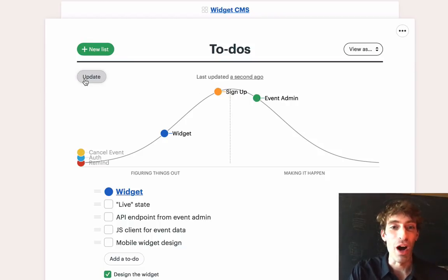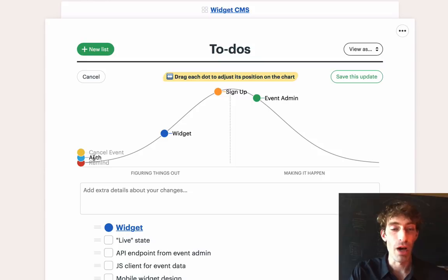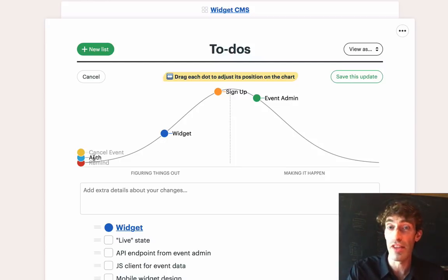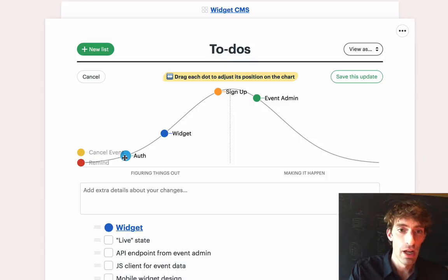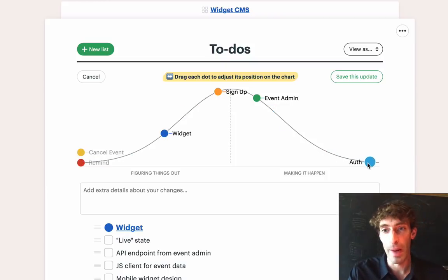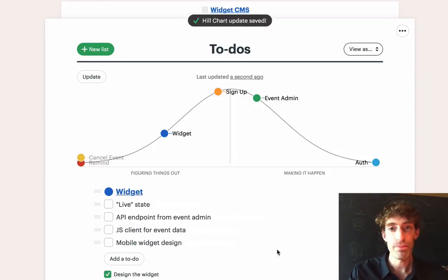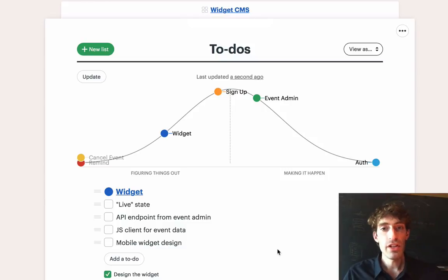So actually auth went from a whole scope of work that could have involved maybe integration with an IT system and setting up a permission rule and everything for who's able to use this backend system, to just a hard-coded password, and boom, we can say that that work is all the way on the other side, and it's totally complete.